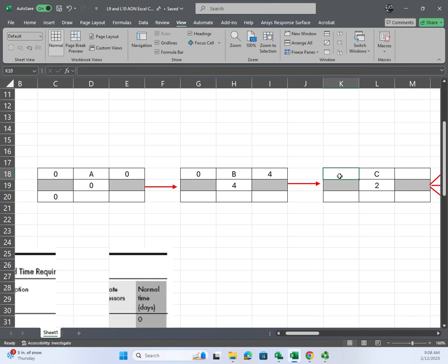Right. So all you're doing is passing forward. You pass the date forward from the last activity when you finished it to the start of the next activity. You with me so far? Okay, I got Cedric nodding. Everybody good? Okay. All right. So literally it becomes a 4.